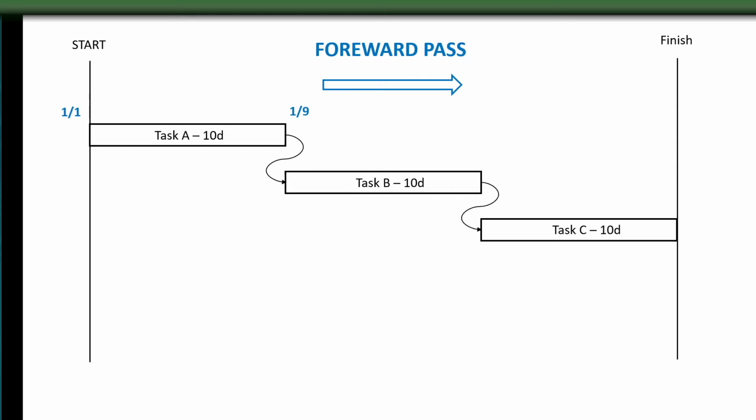The first task officially starts 1/1 at 8 a.m. and finishes at 5 p.m., or whatever you have determined the duration for a work day. So if my task duration was 1 day total, it would have a start and finish date of 1/1. If you added the little timestamp to your date, it would say 1/1 8 a.m. start and a finish of 1/1 5 p.m. An easy way to remember this idea is when trying to find the end date of a task, take the start date, add the duration, then minus 1.